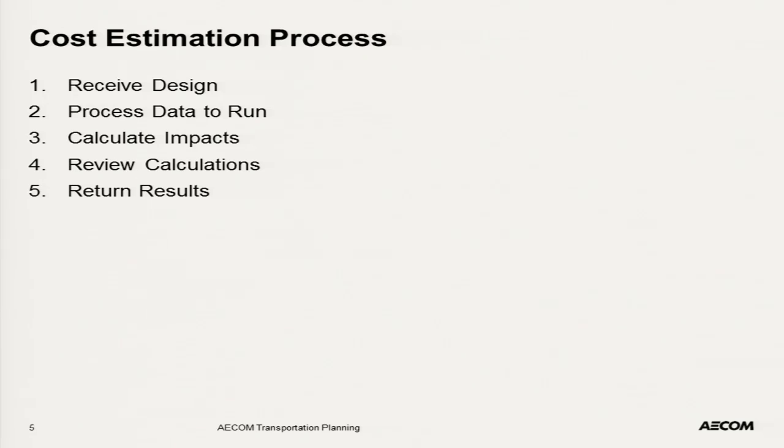One of the other outputs is an Excel spreadsheet that our right-of-way people can use that has a column that allows them to override some of the values that the tool created. That way they can account for things like having to compensate somebody for losing parking spaces or losing landscaping or losing the signage from a business.